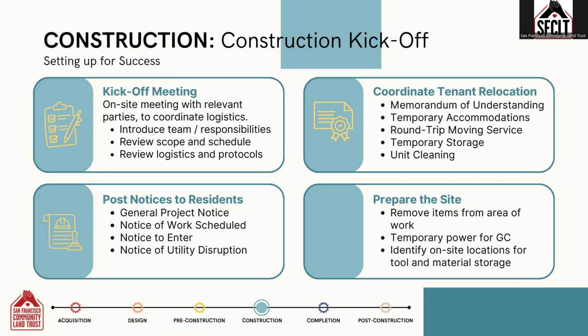At a kickoff meeting, you'll want to introduce the whole team, compile a directory with their emails and phone numbers, and establish responsibilities and communication protocols. You'll also review the scope and schedule in person. It sometimes helps to see exactly where the work is happening and identify what areas need to be prepared or cleaned in advance.